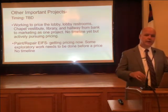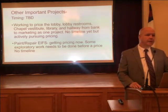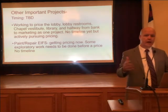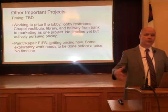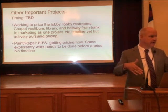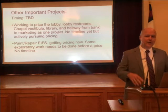So we believe once we get an RFP out, a request for proposals, we'll give them 30 days to get back to us on that, and then we'll choose a contractor and move forward. It'll likely be February before we start work, realistically, because of the holidays and because ordering things will take so long. I don't want to start with anybody's work until they can assure us that they have everything they need on hand. I don't want to hear, oh, we can't get that.